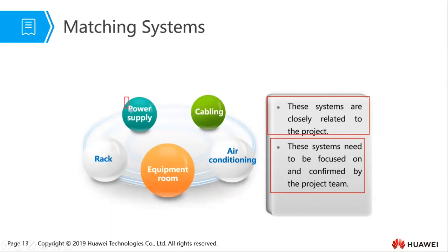For a computer network project, you need to find out about the power supply and whether, for example, a power backup is needed in order to ensure availability of your network, whether the voltage is what is needed, and so on and so forth.